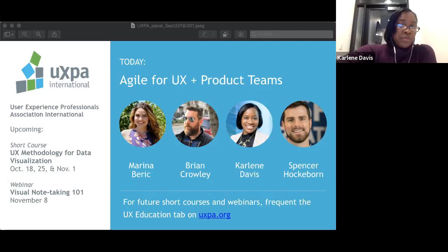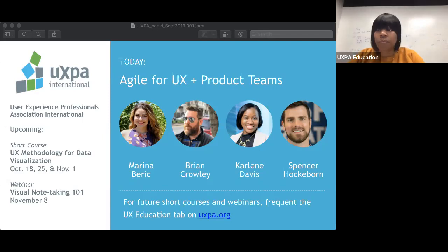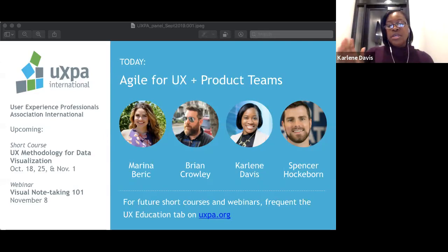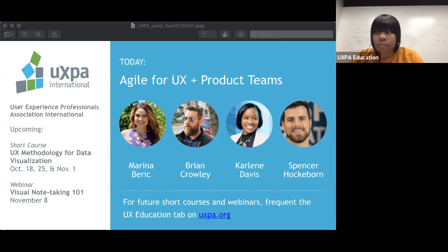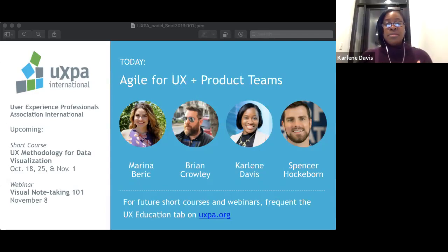So if you're researching and doing that ahead of the sprint, ideally, if you did the heavy lifting and started off the project and have, say, two sprints' worth, you always want to be forward looking with UX and research and product. The reason is that if a feature blows up or there's some change in the market and you need to pivot, you can say, hey, we're going to move to these set of stories and unblock the team. Otherwise, you're going to be in a constant state of trying to catch up. So regardless, it's really important to get ahead.